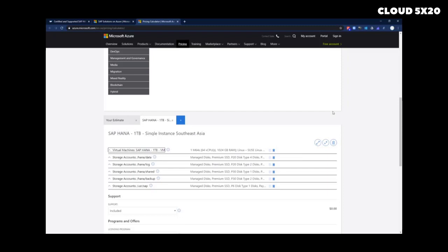So it is vital that sometimes when you do the calculation based on your project plan, you must understand and juggle between, is pay as you go sometimes cheaper than a reserve instance, right? It all depends on the project plan, right? How many hours that the VM needs to run, okay, for a particular project, okay? One example is that development maybe for the first month you might need to run 24 hours. After that you need to run only 12 hours, maybe 8 hours, right? So depending on that, you have to balance your Azure calculator.